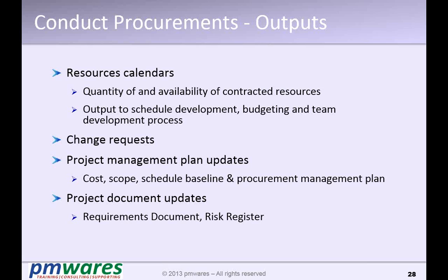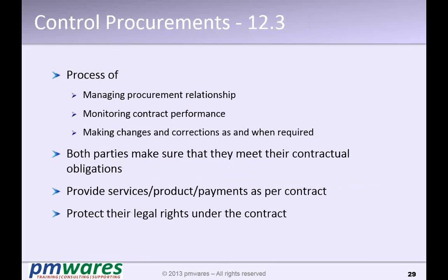So the main output is that you have identified a seller. Once you have identified a seller, now it is time to procure, meaning deliverables. During this time, you will review the premises or the place where the construction or the preparation or the development is happening. You see that whatever the terms and conditions are, they are complied with. You do reviews, walkthroughs.